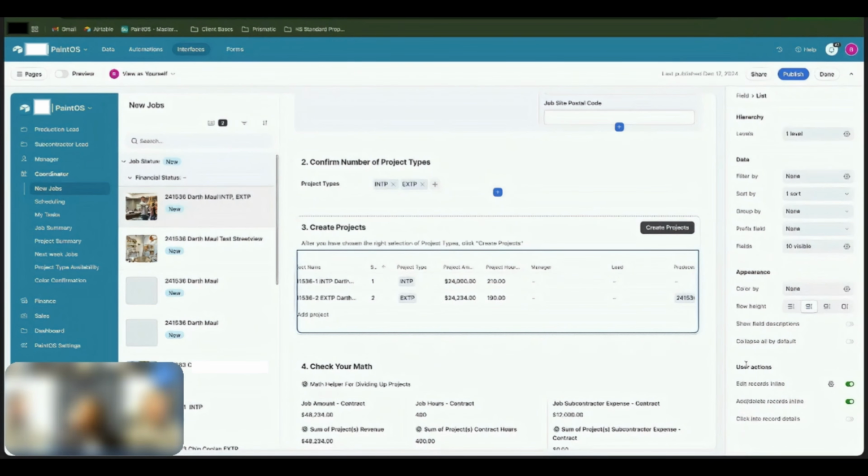Yeah. Knowing that we're coming back in a month, you're just closing a project, because we're breaking it out into 3 different projects. So the interior, exterior, carpentry, we're breaking all of that out. Once carpentry is done, because that goes first, we're billing that. Okay. Interior billing, exterior billing.